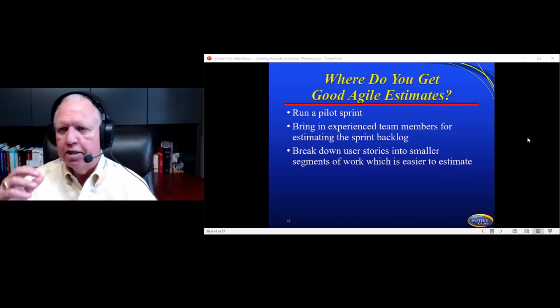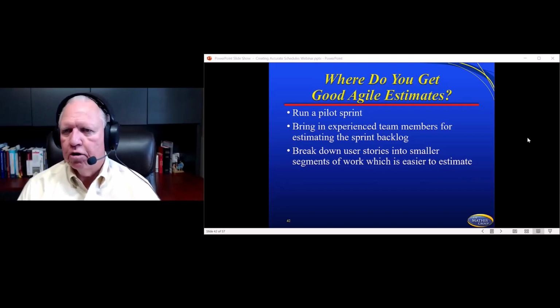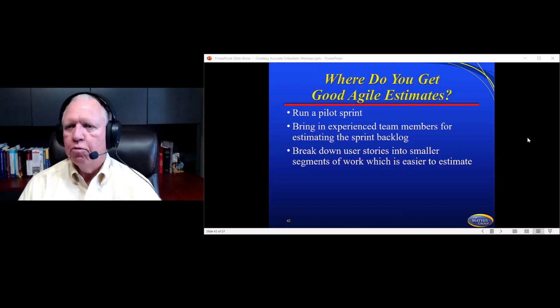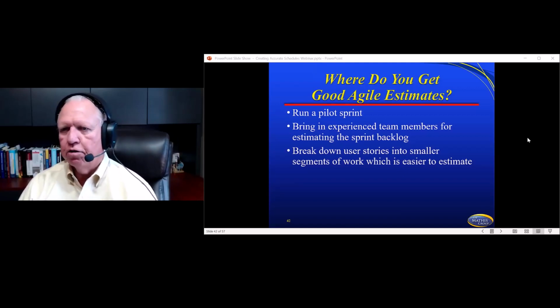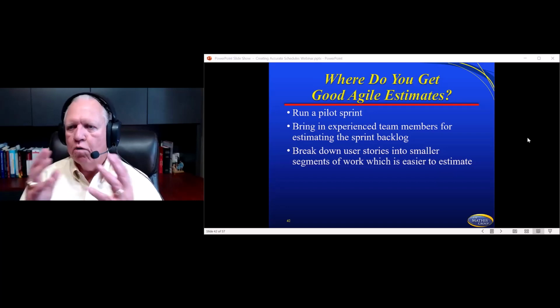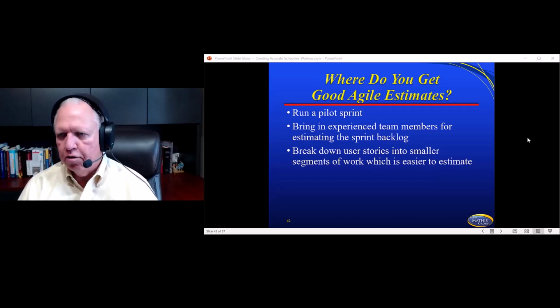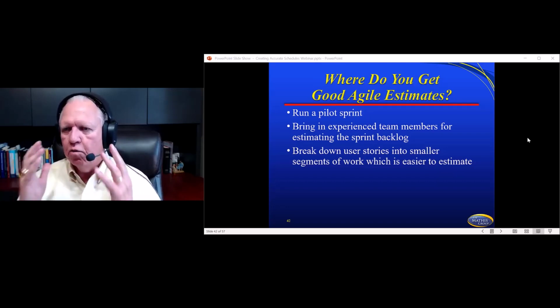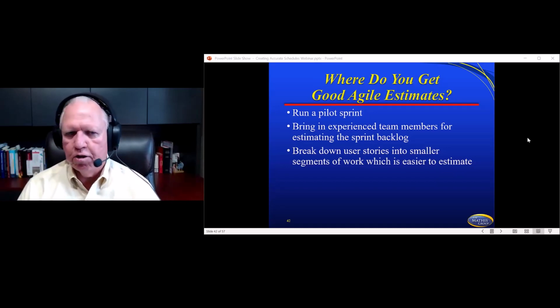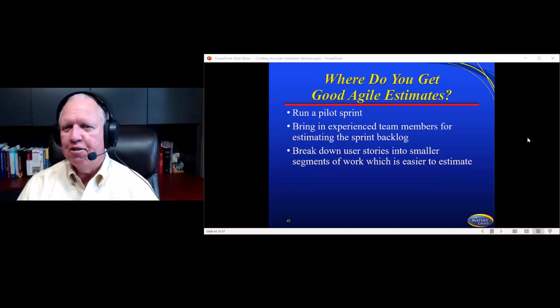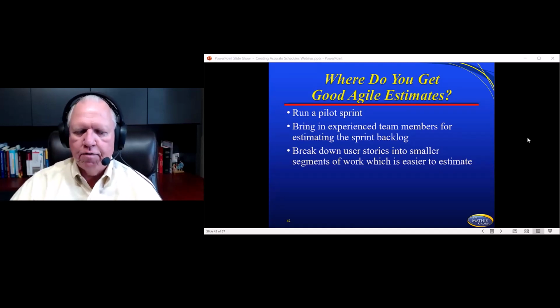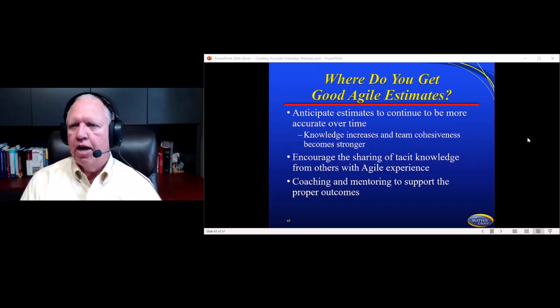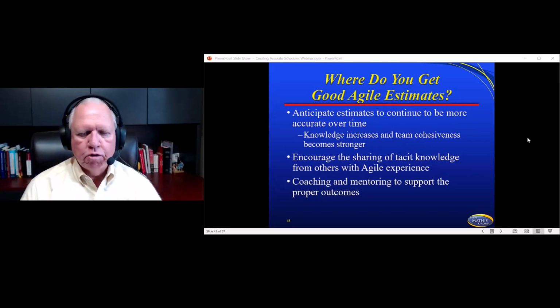If it's a horrible project, a very deadly project, many people are giving 4 times the most likely. But one of our clients actually told us they do 4 times the pessimistic. If it's such a horrible project with so many risks associated, they'll do 4 times the pessimistic. So they'll do optimistic, 4 times pessimistic, and most likely, and they'll do the average divided by 6 to see whether that estimate is close to what's been given to them. None of that's perfect. I get it. You might not like that, and that's okay. But it does give you a way to go back and see how close these are.